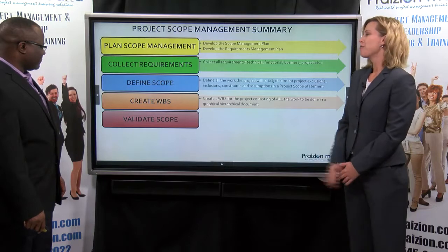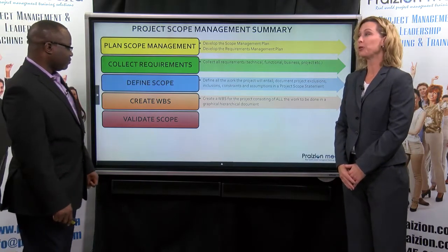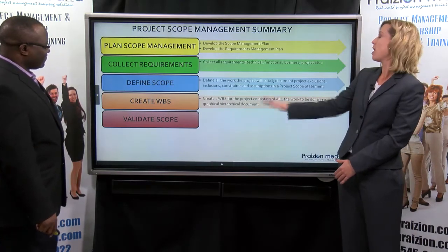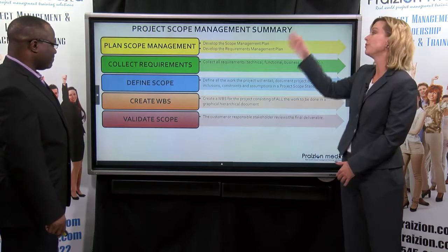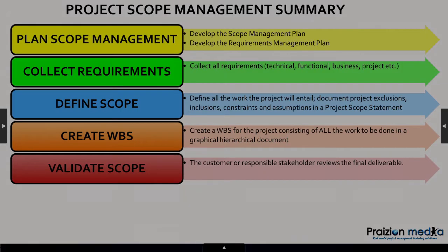Validate Scope is in the monitoring and controlling process group. That's why I forgot that it existed. Because generally speaking, we come back to Validate Scope after we've done all the other planning and executing within our project. But we do validate scope throughout the duration of our project.